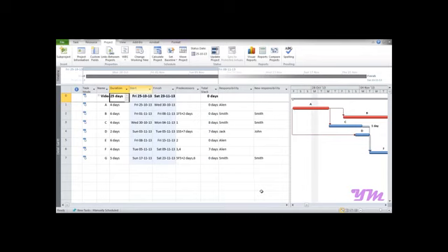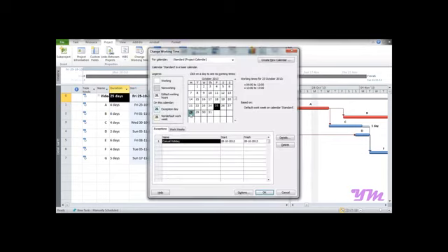Now click on OK. So now when we again go onto the calendar, we can see that this is a holiday. Now suppose we want to add a holiday for every 4th Saturday throughout the year. For that we just need to go again under the exceptions tab and write last Saturday holiday for each month. Now after entering this, select details.